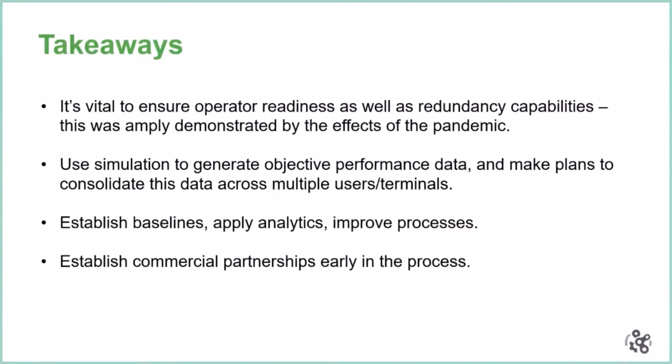It wasn't done in the case of Ashdod, but now, with the experience of the project I worked on, I would include simulators as part of this one solution. As you say, the simulator needs to be as close as possible to the realistic remote operating stations or equipment, because there is still some equipment, even in full automation, like the ship-to-shore cranes, that is not fully automated.